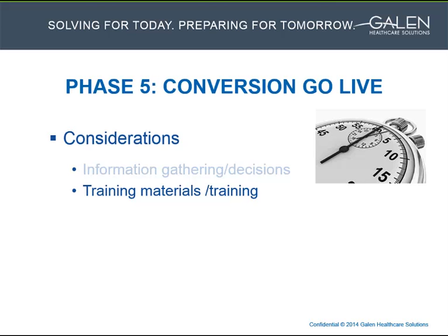At a minimum, making the conversion documents, which are the decision document, mapping workbooks, and issues lists, things that came out of testing, available in a central place, such as a folder on a conversion server, is a good idea, as these can be very valuable for reference. And then one more mention here, it's helpful to understand from the client whether the legacy EHR application will be available to end users at all post-conversion, even if in just a view-only capacity. Knowing this can help direct whether it will be necessary to guide the clients to prepare any reference materials or paper printouts or whatever that might be.